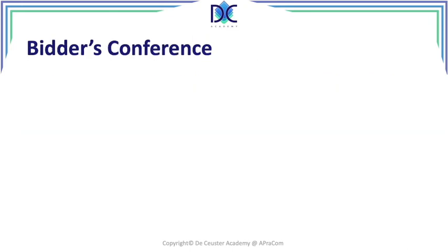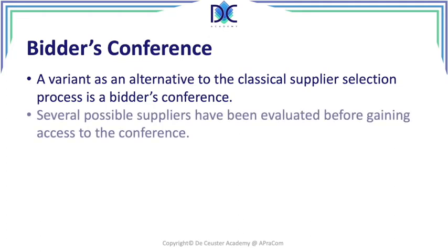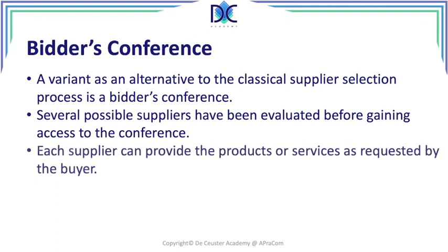We also have what we call bidders conferences, which work in a different way compared to the classical RFP. You bring all the people together and the people will be online offering typically discounts. And of course, the people who are accepted to the conference have been selected before. So not everybody can participate in the bidders conference.